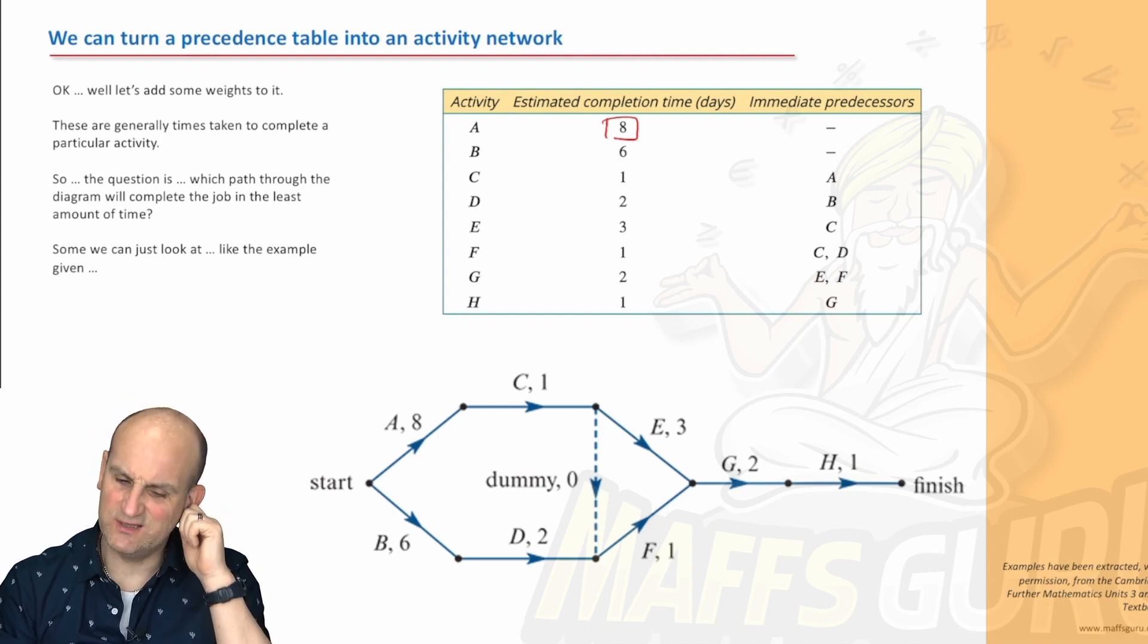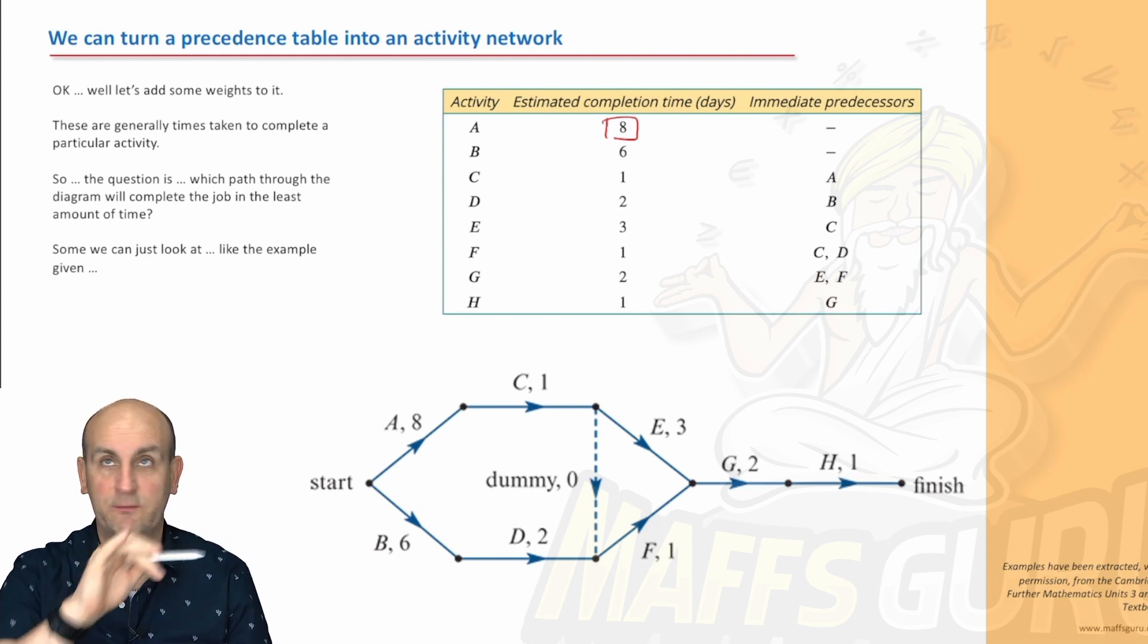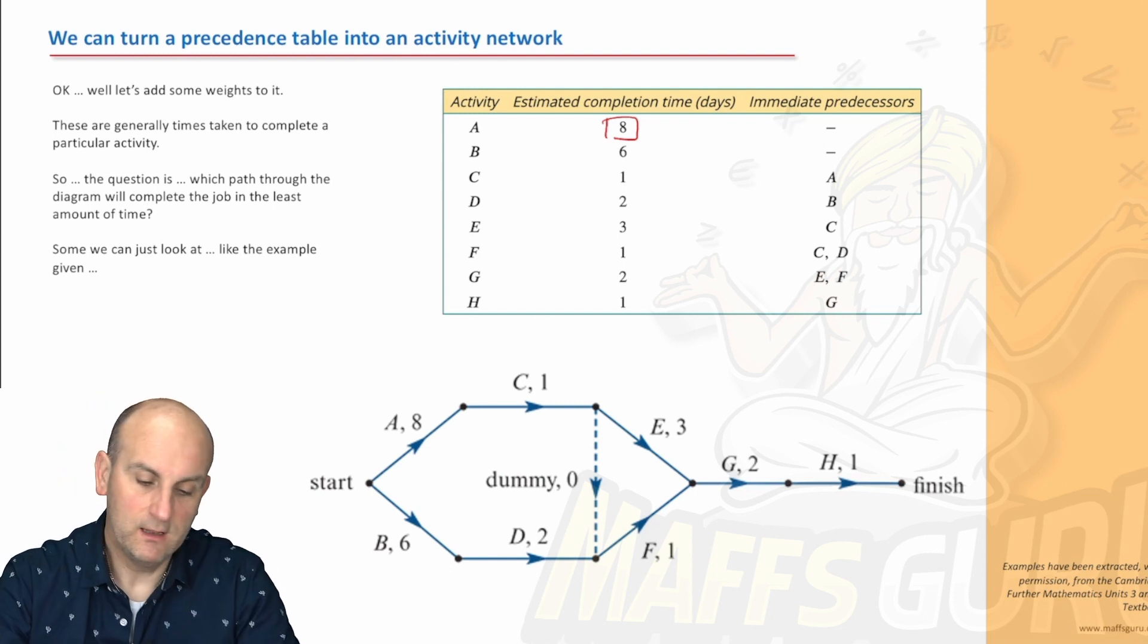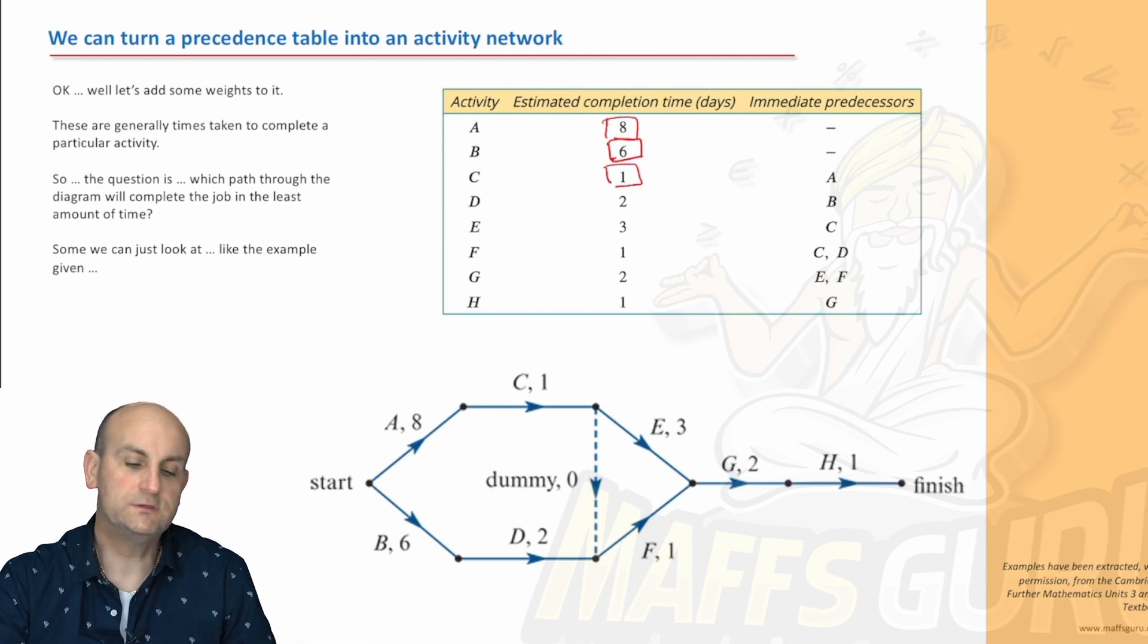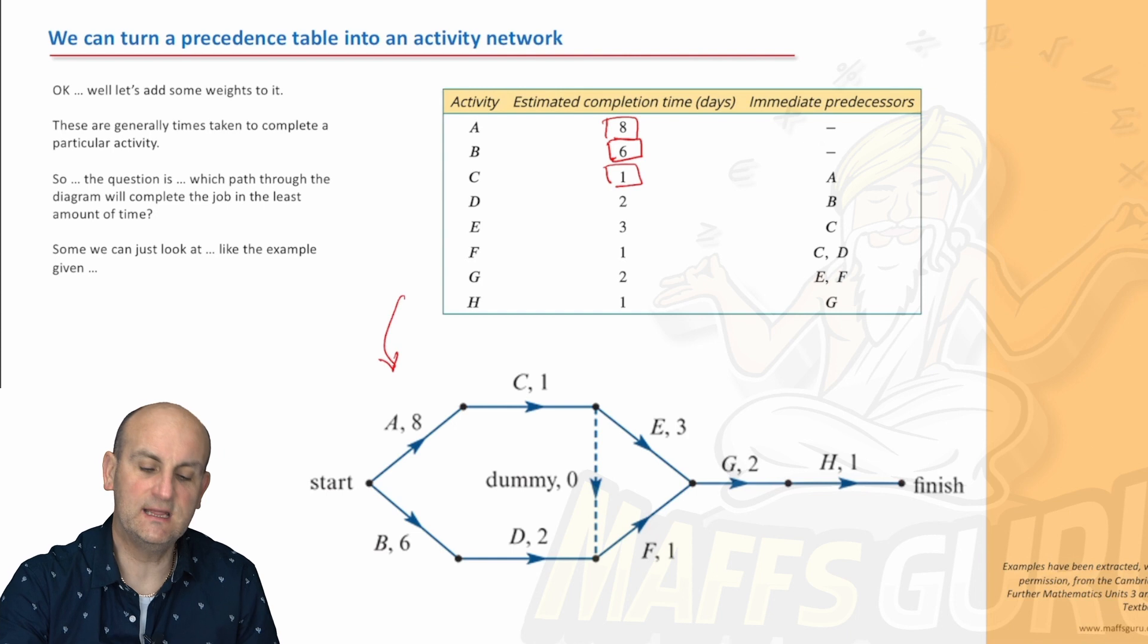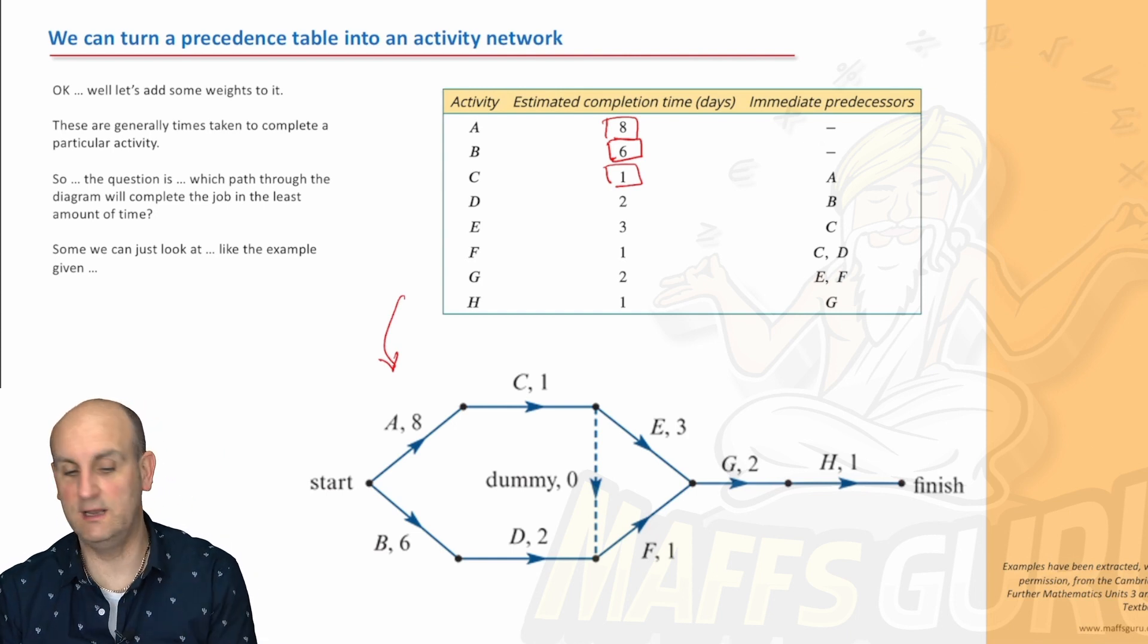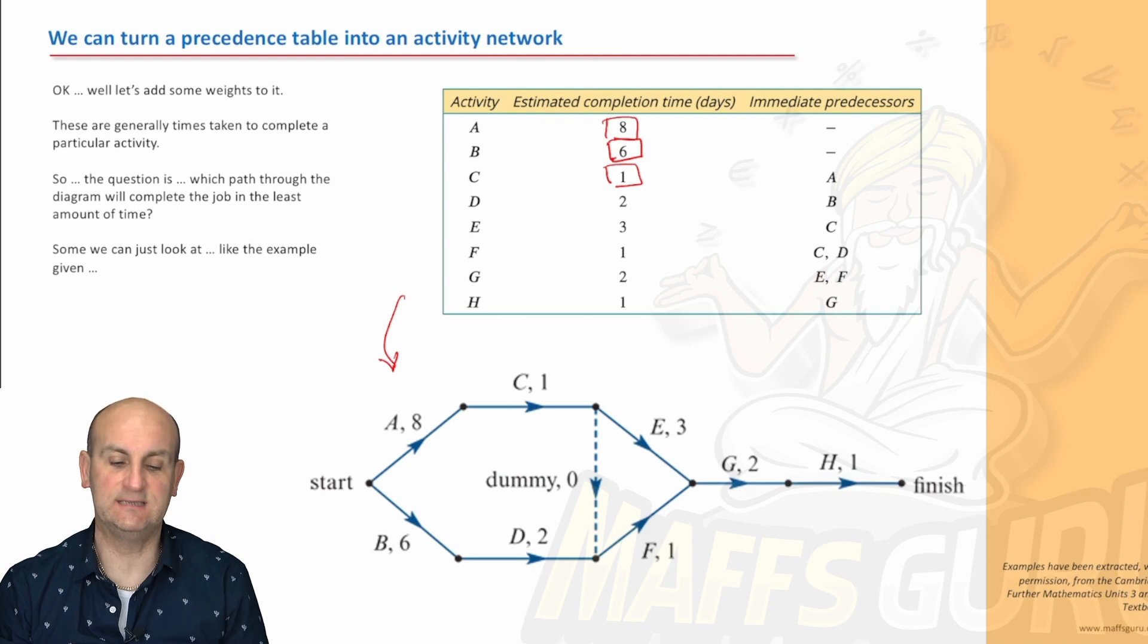Let's work out. Because actually, do you know how long it's going to take to do this whole project? No. Not at this moment in time. You might have an idea, because you might want to walk around the dummy network. But we know for B, it takes six days. For C, it takes one day. So, turning a precedence table into an activity network is really, really important. But what do we do now?